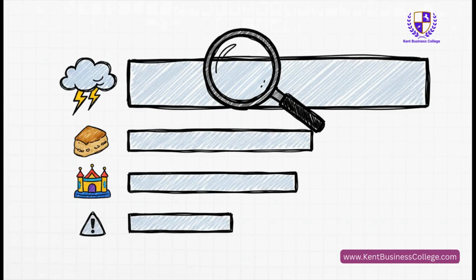And that's the golden rule. It's so beautifully simple. The longest bar at the top is the thing your project is most sensitive to. That is your number one headache, your top priority. For our little fete, it's not the Morris Dancers Beer Fund or the bouncy castle. It's the famously, wonderfully unpredictable British weather.